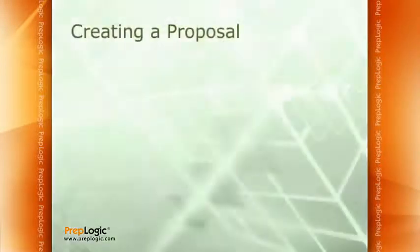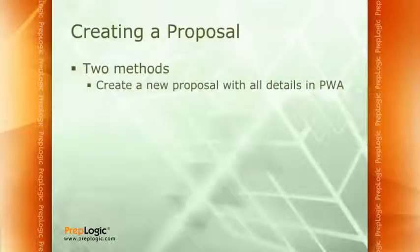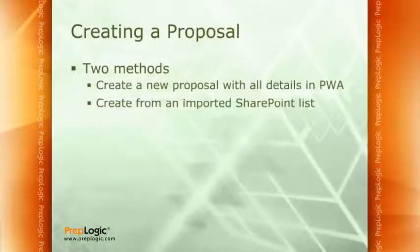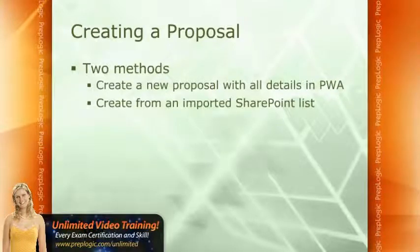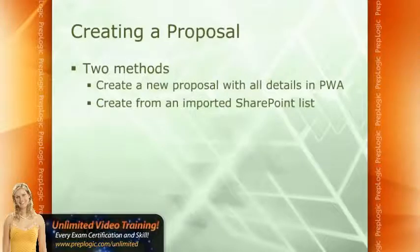So how do we go about creating a proposal? There are two different methods. One is to create a new proposal with all the details in PWA. The second is, if you have Windows SharePoint Services, you can create it from an imported SharePoint list. If you were having some collaboration out on the SharePoint site and people were putting in their ideas, you could build a task list, and that task list is what we're talking about importing.